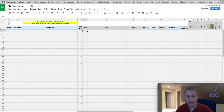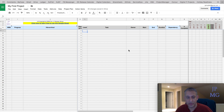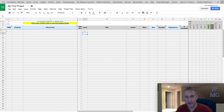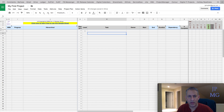The first thing you want to note is you always want to enter at a level starting with one. So your first line in your project plan should always have a one in there. You can have multiple level ones, but always start with a one. I like to make my first task basically the name of my project.